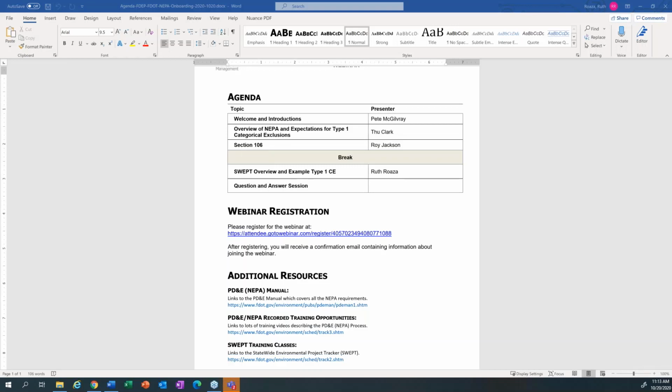So once the priority list has been approved, I believe we're including NEPA expenses as part of any pre-agreement expenses that can be requested at the time of reimbursement. But typically, any cost incurred during this planning period is usually reimbursed as a single payment at the very end once the project's complete.